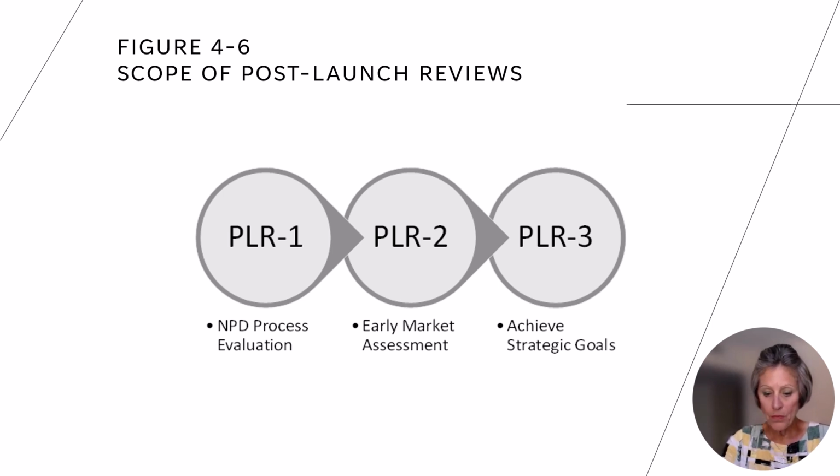This feedback provides improvements to the staged and gated process, as well as to decision-making systems for the portfolio management team and project gatekeepers. The process owner should participate in every post-launch review to develop long-term learnings and to identify streamlined activities for future NPD process efforts.